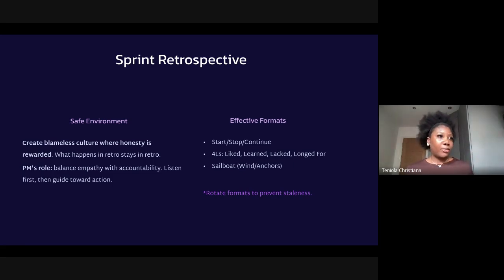Maybe initially you put 6 stories in a sprint, and you realized after 1, 2, 3, 4 sprints that you were always leaving about 40% of the items within a sprint undone, unfinished. So you really want to be able to get to a point where you can realistically estimate how much capacity each person has, and where you can identify issues that will put the sprint at risk of slipping backwards in terms of progress and in terms of completion.